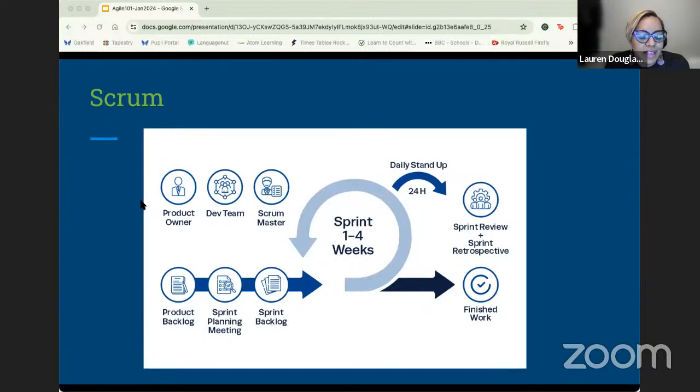In that session, they'll look at their product backlog, and this is their list of work that they've already discussed and ironed out and understand very well. And they'll pick out the pieces of work that they think will satisfy that goal. And then they begin work. So they start picking up the pieces of work, maybe assigning it to the individuals in the team. And then each day they meet and they'll discuss, how's progress going? Are there any issues or blockers or concerns that will stop us from realizing our goal? And then take action. So someone will volunteer and pick up something and help someone to ensure that there are